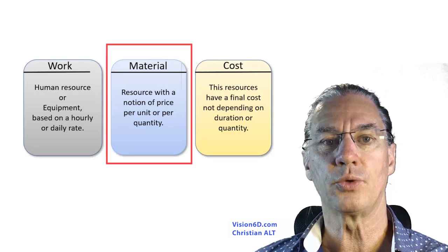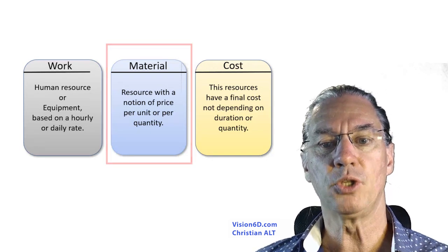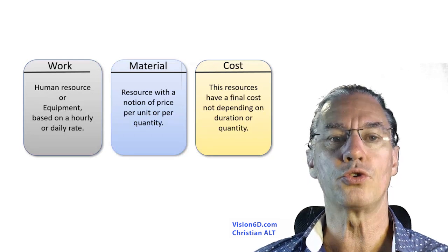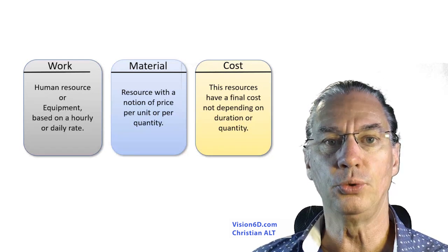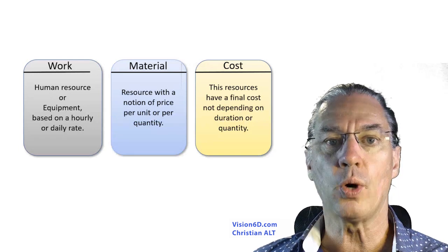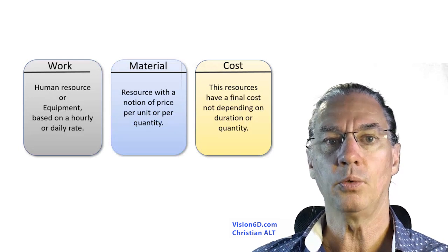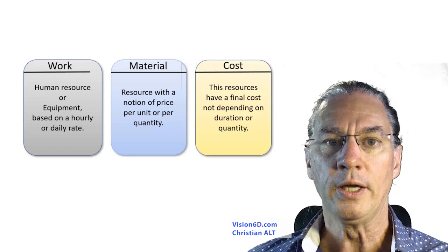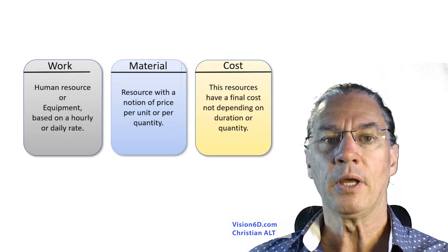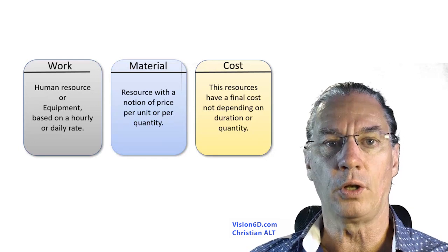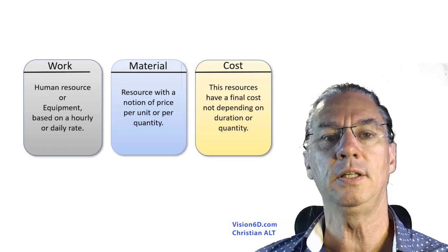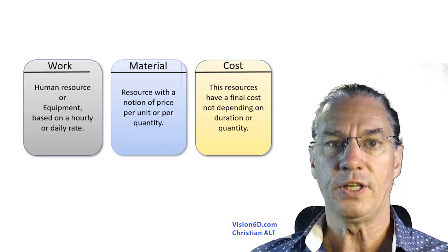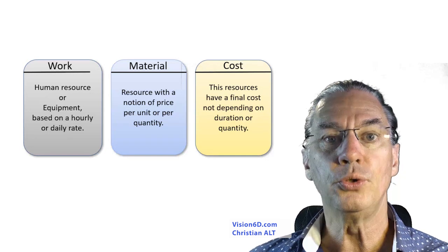The second resource type is material. By material we have a notion of price per unit or price per quantity. For example in this project when we are going to do the concrete slab we will have a certain volume, a certain quantity of concrete. For this there will be a price per unit.